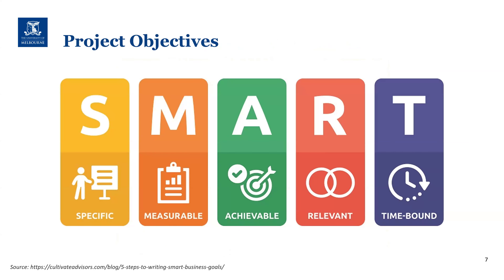How can we formulate project objectives? Using the SMART acronym: Specific, Measurable, Achievable, Relevant, and Time-bound. In tutorials we've explored variations — for example, in Scandinavia, the 'A' becomes 'Agreeable': you agree as a team this is doable, and if you fail together having agreed, then you know it wasn't possible. There are some controversies around this, but it's more or less the same concept.